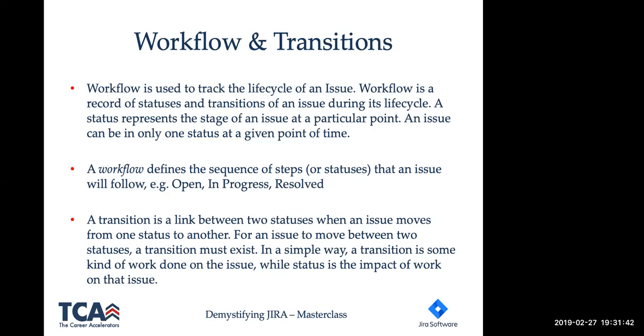So workflow is that, it's kind of used to track the life cycle. So it defines the sequence of steps or statuses that an issue will go through. And then a transition is closely related to a workflow. So a transition is the link between two statuses. So a workflow provides that picture of it goes from status A to status B to status C. A transition defines what needs to happen for that issue to go from status A to status B.